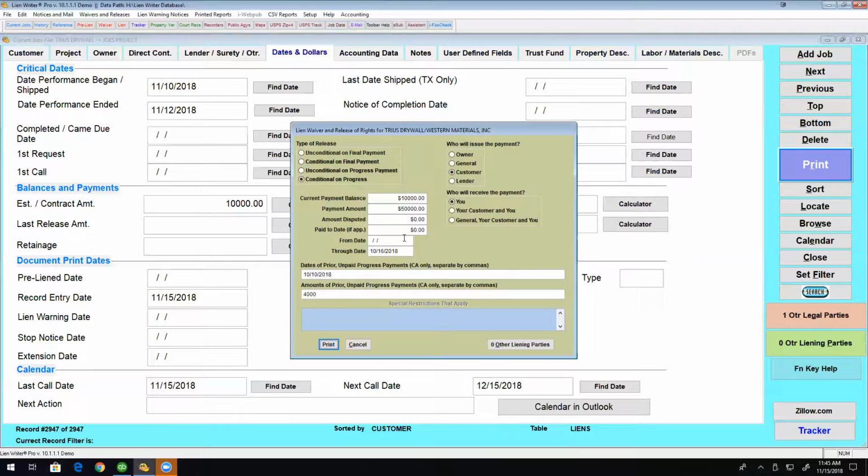Why you want to do that? Because this one, they could say in court that, well, you gave us, this one is irrelevant, and we're only going to pay on this one because you guys didn't name it. Okay, there's been court cases on this now. And they did provide for that in the legislature when they made the new law. And this is how you protect yourself, all right? If you're doing a release again for somebody and you don't have your prior release paid, please put it in here.